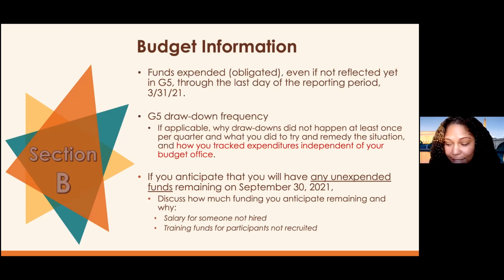But please, please, please draw down. If you want to keep your funds, show that you can use your funds. If you're not spending down, that's the number one reason why we have budget cuts. At the end of the fiscal year, if you have a large remaining balance, if your whole year's funds are remaining, you are guaranteed to receive a budget cut.